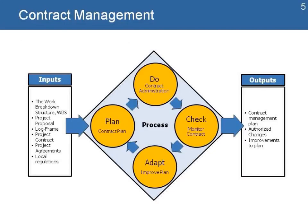Let's look at our process. We have our inputs: we look at our WBS, the project proposal, the log frame, the contract, any project agreements, and local regulations. We have our plan, we administer our contract, we check and make sure that we're complying with the contract, and then we adapt or make improvements. Key outputs of this process are a contract management plan and a process to authorize any changes and improvements to the plan.